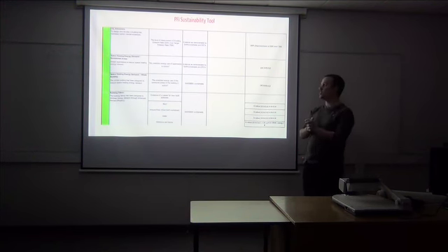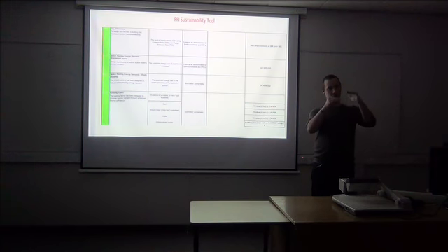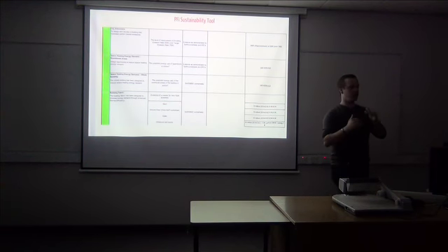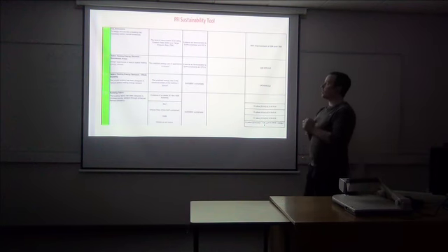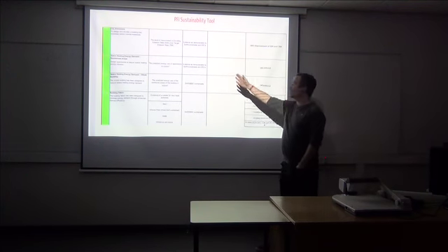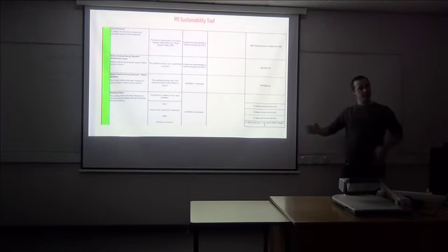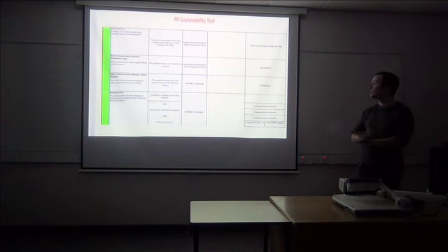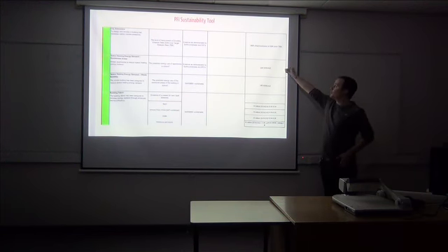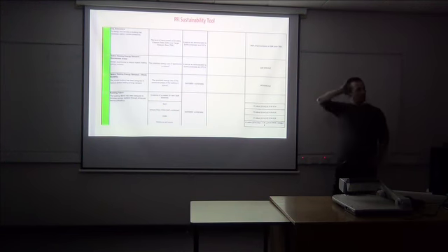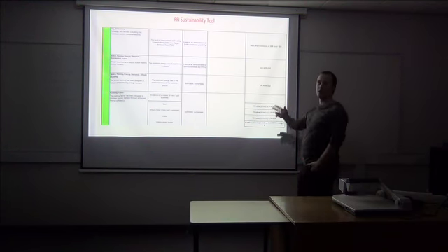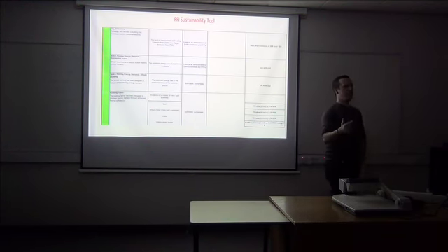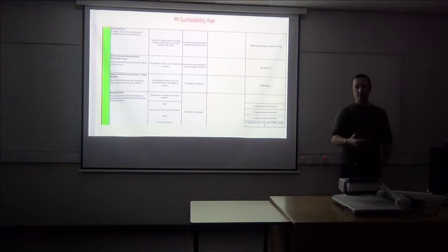Then you have a target emission rate. So you have a reduction by a certain percentage. And so our indicator was, what is that percentage? And the way we were going to measure that, we were going to have evidence demonstrated to us from the outputs of these computer programs, and then we could score them depending on how well they did. So we can come up with an indicator system that says, if you provide a 10% reduction of carbon, you get 1 point, 20% 2 points, 30% 3 points, for example, okay?